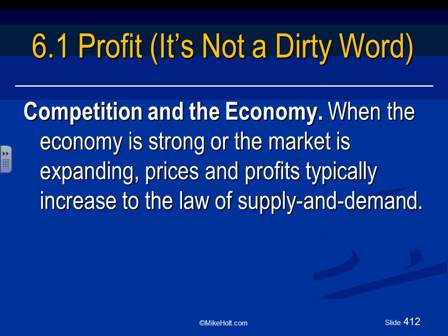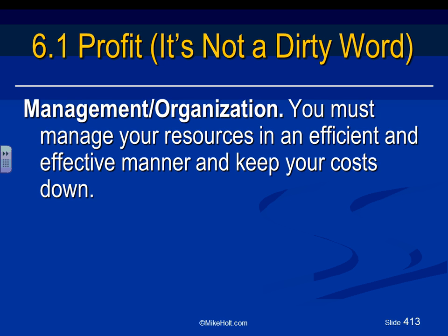Any comments, guys, about the effect of the economy and your competitors on your profit? The more people competing against you, the less profit you're going to assign to the project to get it, especially if they're competitive, if they're experienced. The hotter the economy, the stronger the economy, the more profit you can get. It makes sense, right? Common sense. Any comments, any questions? So that's assigning your profit.